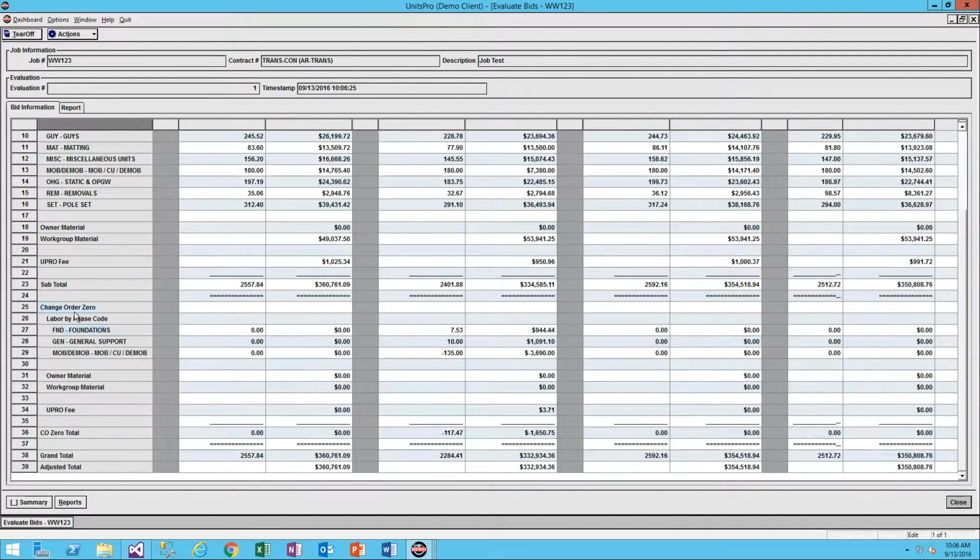And we've got a thing that we call change order 0. If changes are made in the design, we'll see what they are right here. So if you recall, work group 1 said, hey, we had 2 errors in our concrete backfill, and they added more footages to those, which increased this. They also said, hey, we need more safety on this job, so they added hours to that, and then they reduced their mobilization and demobilization. So overall, 2 ups, 1 down, and came up with a reduction of $1,600.